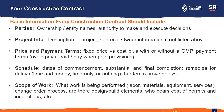First, you need to know the parties — the ownership and the entity names. That gives you an idea of who has the authority to make and execute decisions. You'd be surprised, sometimes the party names aren't on the contract. It helps to have a description of the project, the address, and then the owner information can become important for preserving your lien rights if you're not contracting directly with the owner. For example, if you are contracting with a tenant in a commercial space, you need to know who actually owns the building if you end up putting a lien on that property.